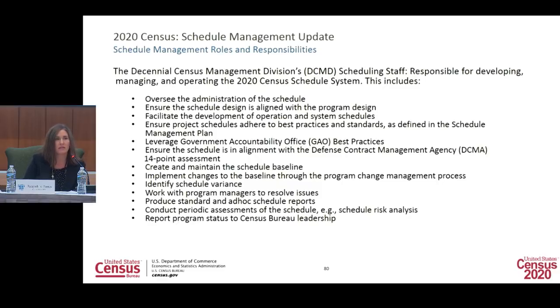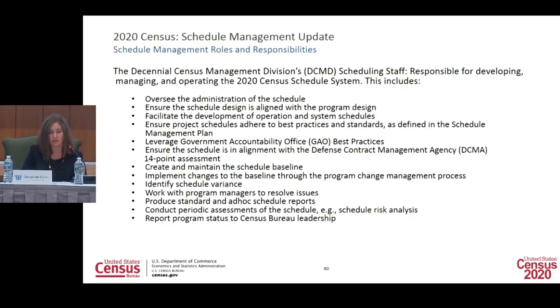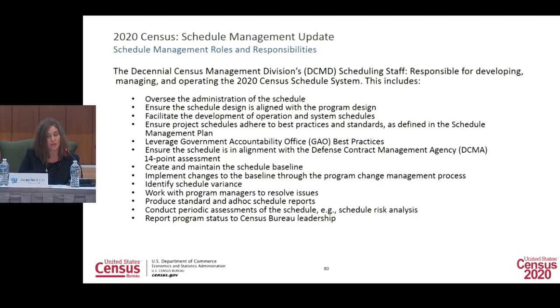I want to talk a little bit about the schedule management branch and their role in supporting that. So they are responsible for supporting the entire architecture, and this includes developing, managing, and operating the schedule system within Primavera. We work with the project managers to build their project schedules, integrate them into the IMS, and ensure alignment to our best practices and standards. We're responsible for managing these baseline schedules via our established change control process and producing standard and ad hoc schedule reports, as well as reporting program status out to Census Bureau leadership.